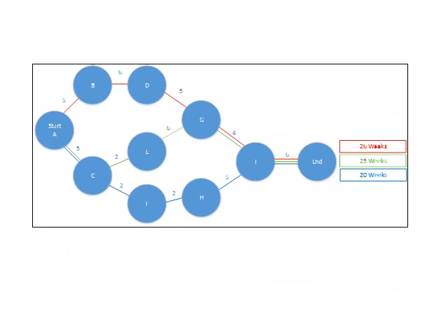So looking at the diagram, the main objective of this diagram is to establish the longest path, in other words the critical path. So if any of these items takes longer, the project will take longer. But for our purposes, we're looking at this to establish how long will the project take under normal circumstances.